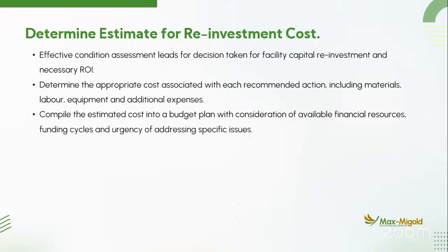Then it also helps you to determine estimates for the investment cost. Effective condition assessment leads to decision taking for facility capital investment. Because when you do your assessment, you are able to decide that if I repair this facility, will that facility actually yield the expected return? And if the answer is yes, for how long do I have to wait before I will start talking about profitability on this facility? It also helps you to determine appropriate costs associated with each recommended action, including material, labor, equipment, and additional expenses.